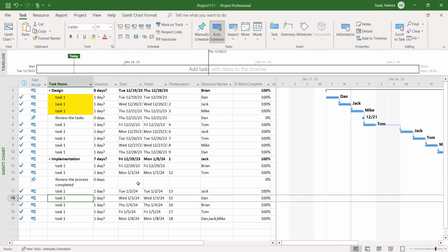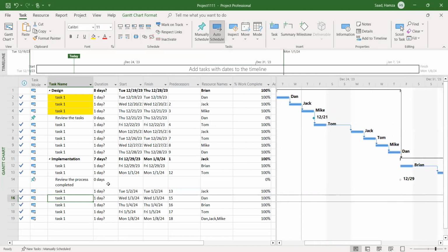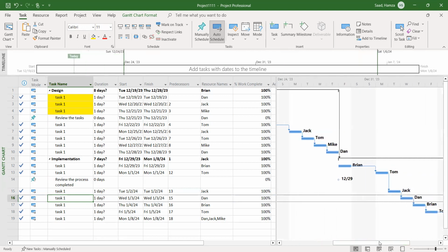Here we have 0. We have 0 days. Why? Because this is not managed by the process. It is managed by other people, the third party who are going to come to review whether my tasks have been completed correctly. Then I need to go to the milestone to establish the start and finish time here. What I'm going to do is drag it to the right place here. Then I'm going to drag it here to be connected. Then the dates have been created.